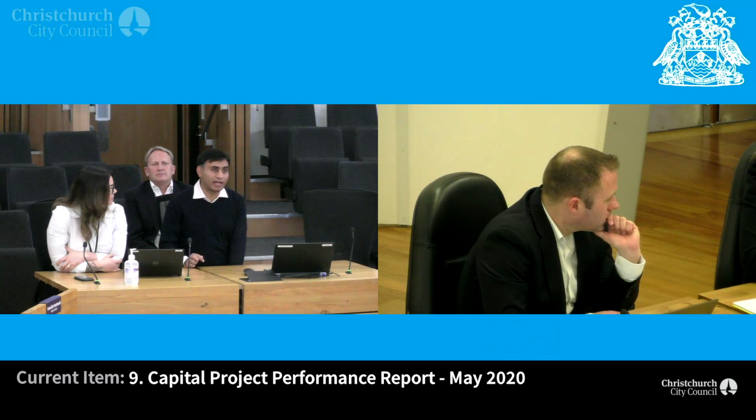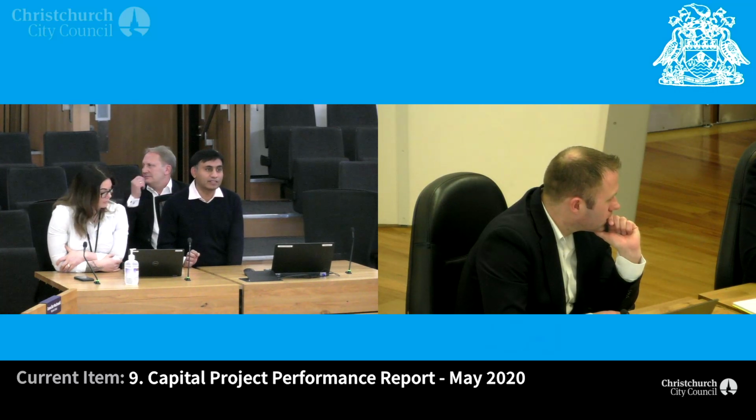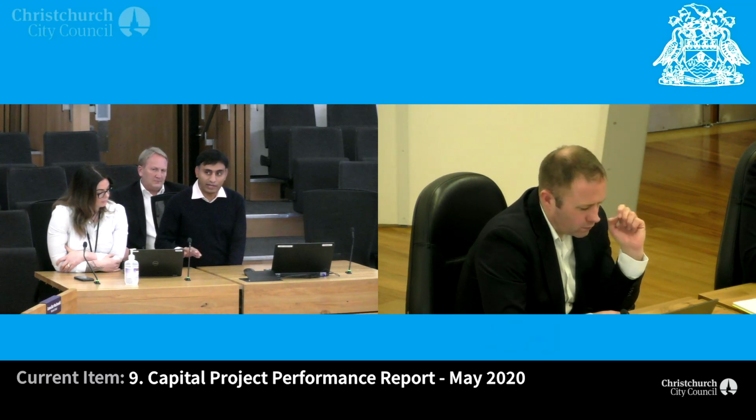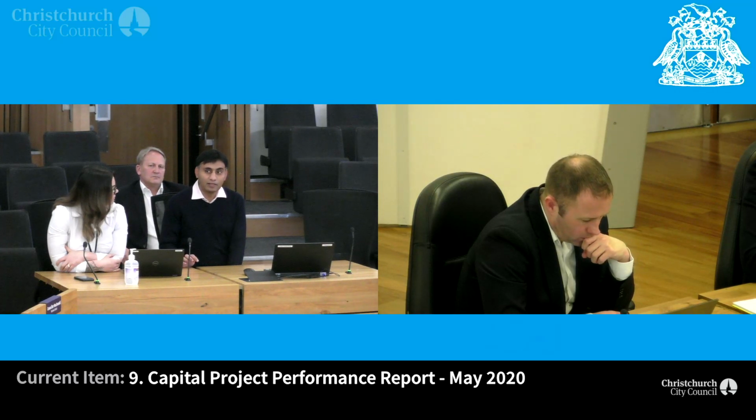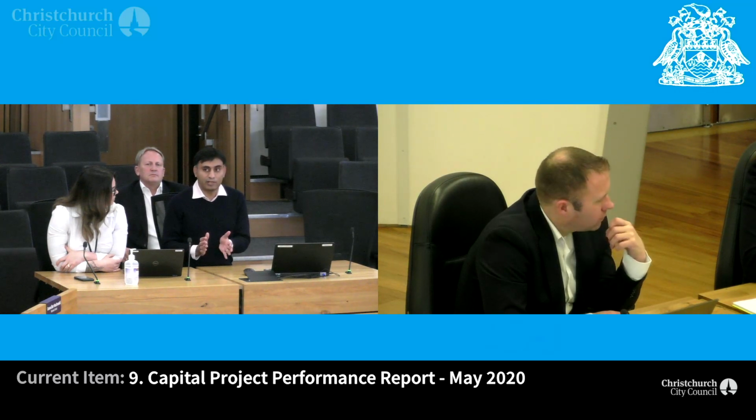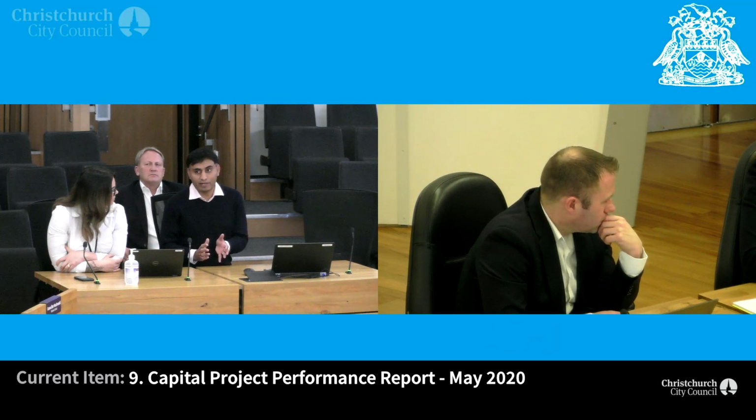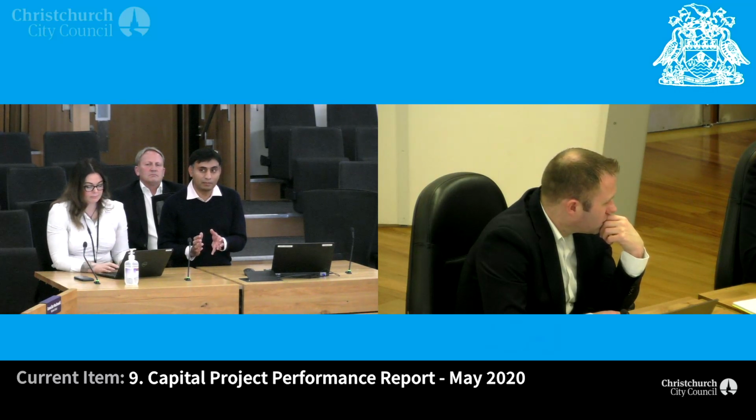So there has been a lack of productivity on this project. We are assessing the ground conditions, which turned out to be quite different than we anticipated. So we have had very little progress on that. Still, we are able to complete 50% of the works. So as you asked, the confidence in this completion date is still under assessment, but that's what we are forecasting at the moment.